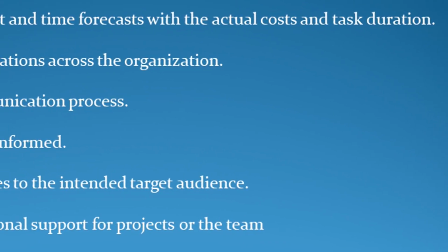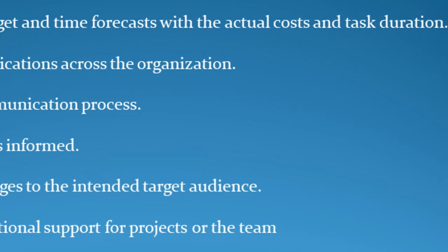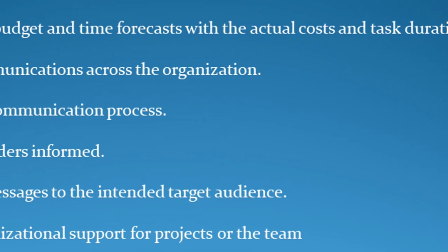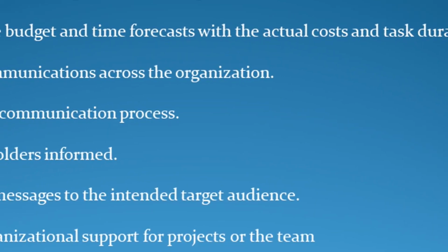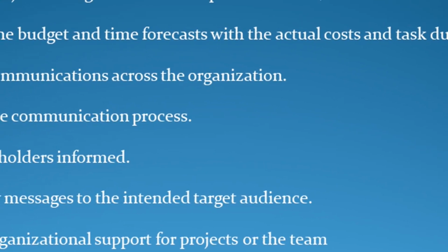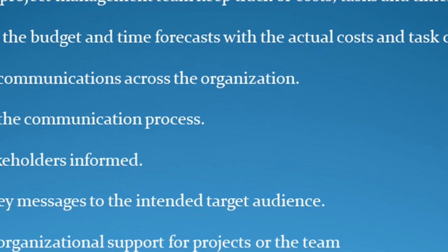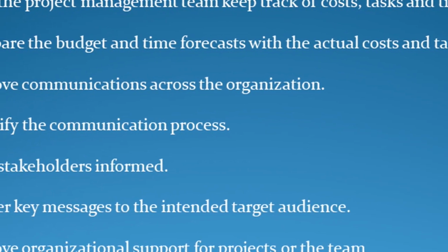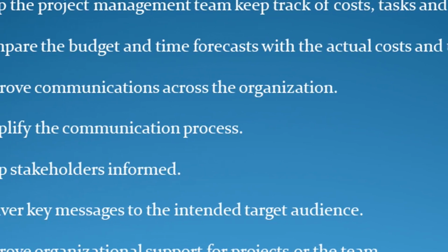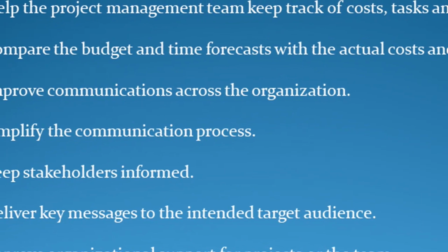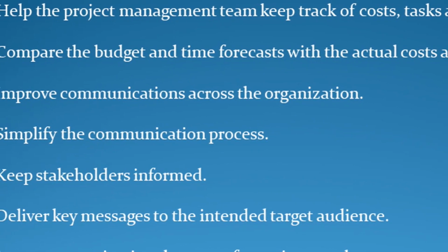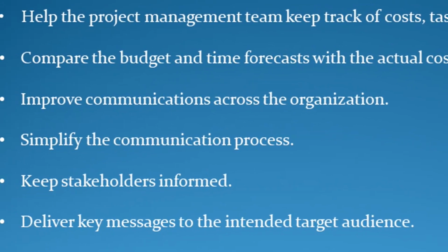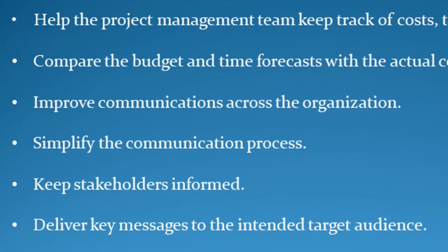Like any report, start with an introduction. Give a short overview of what is to follow. List the accomplishments, use hard facts, numbers and details, and how they reflect progress to achieve the overall goals and objectives of the project. Note any bottlenecks and roadblocks that are preventing the project from progressing. Set expectations by detailing risks and issues that could grow into problems that make it harder to reach the target. Also, write out the plan to address and resolve these issues as they arise and what resources will be needed.